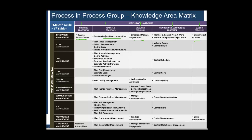There are processes everywhere on this matrix. What it means is that 'Develop Project Charter' is a process which belongs to the Integration Management knowledge area and is part of the Initiation process group. Now if I ask you how many processes are in the Initiation process group, you just need to look in the first column and find that there are just two processes: Develop Project Charter and Identify Stakeholders. Similarly in Planning, you have processes from all the knowledge areas — not even a single knowledge area row is empty when it comes to Planning.